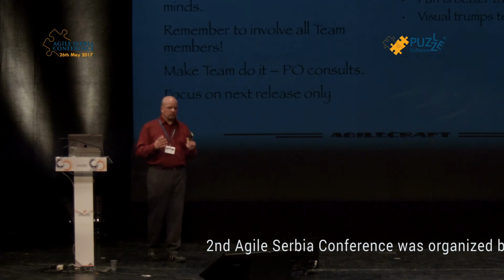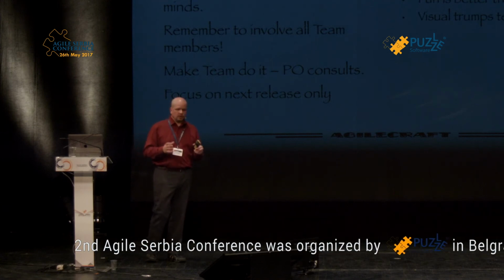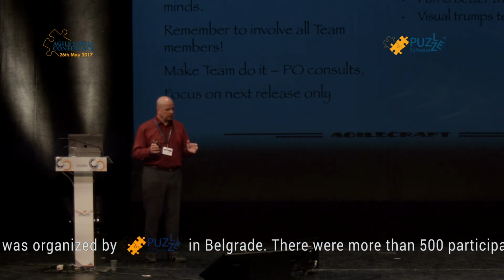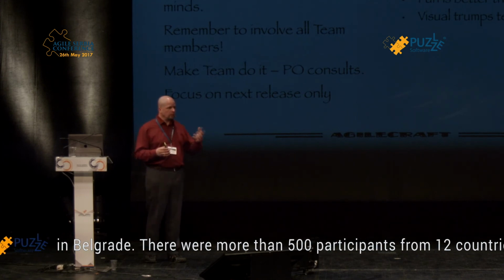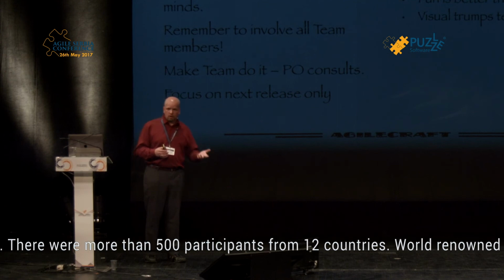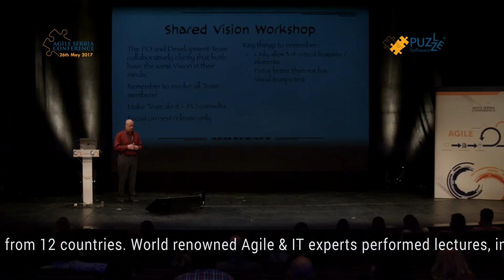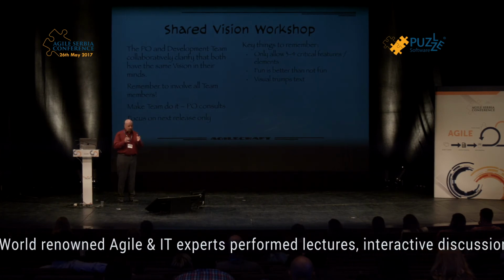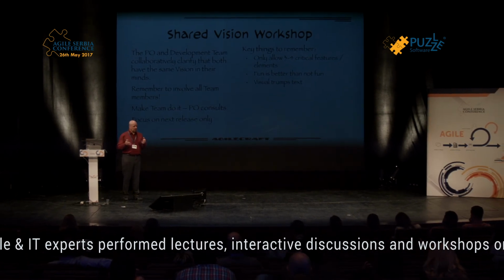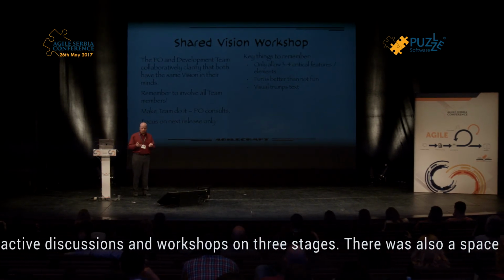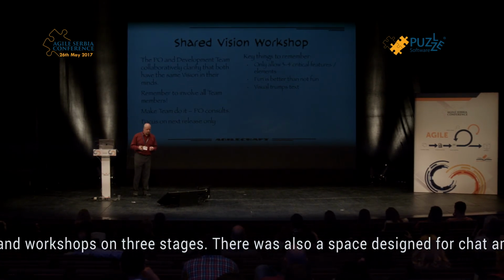only allow the team to select 3 or 4 critical elements in that expression of vision. Now, it's perfectly expected that they talk about all the different things that could be and are important, but they have to choose a limited number from that. The reason is, if you have everything, like 20 things that are important, how are you supposed to prioritize between the items in your daily work? So you need to force people to understand what's the most critical things.